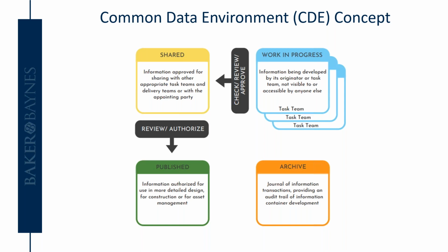A lot of the times the appointing party here, we are referring to the client. Then again, a review process to a published container or a published state where information is authorized for the use of detailed design, construction, or asset management. And then there also needs to be an archive.